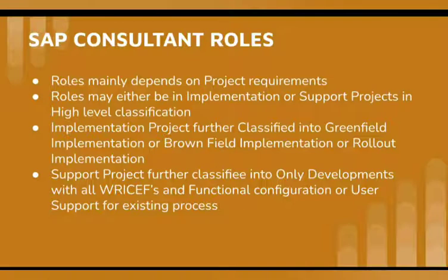Mostly this development begins with the creation of a change request. The change request is used to track all the developments in a standardized way. It documents all the development requirements, which are collected from the business users. We have several tools like ServiceNow that can handle these support tickets and standardize the change request process.